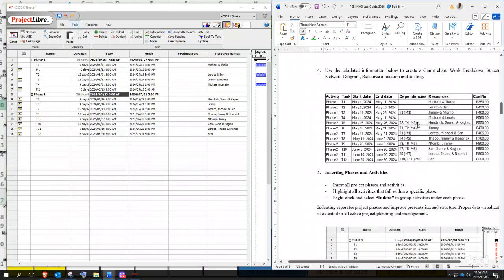Let's observe T2 and T4 first. T2 finishes on the 16th, T4 finishes on the 11th. So between the 2 tasks, which task takes the longest, or which task was completed last? It is T2. So you will always choose the task that was completed last. Why? If we put a milestone under T4, we would be saying that on the 11th of May the business model was approved, but what if the business model was only finalized on the 16th?